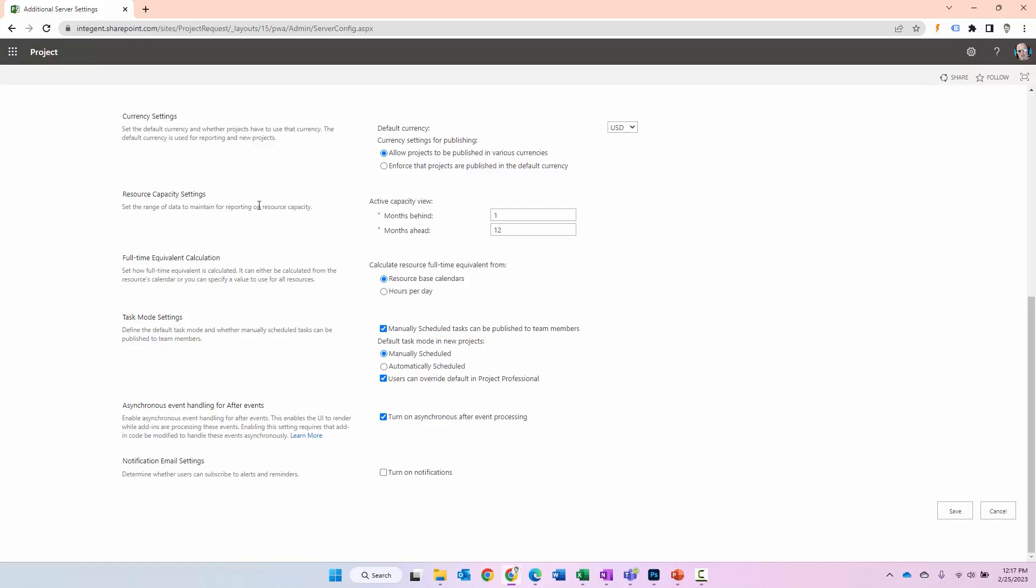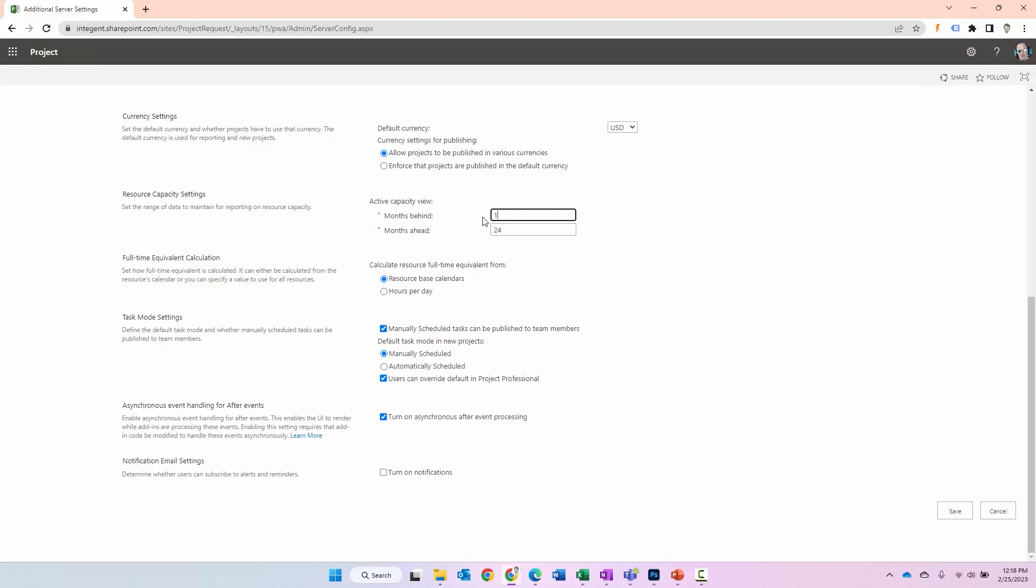Currently it's specified by default to only generate going back one month and only forward 12 months. You might want to consider going back more months just for historical info. You might consider going farther than 12 months if you have projects that are longer in duration. Pretty simple stuff. You can specify 24 in the forward and six in the back, whatever works for you. Just think about this for a little bit and consider what might be good for you.